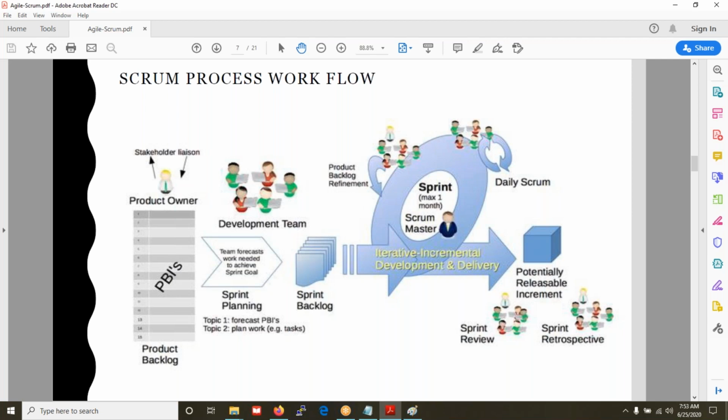And once they have decided which one has to be developed first, they are going to start developing the application. Suppose registration page, login page, payment gateway, as well as product catalog page. If you start developing the application from the payment gateway, is it going to be useful for you? No. So that is why we have to refine that properly: first we develop the registration page, then the login page, then the product catalog page, and after that the payment gateway page. This is the order we have to follow.